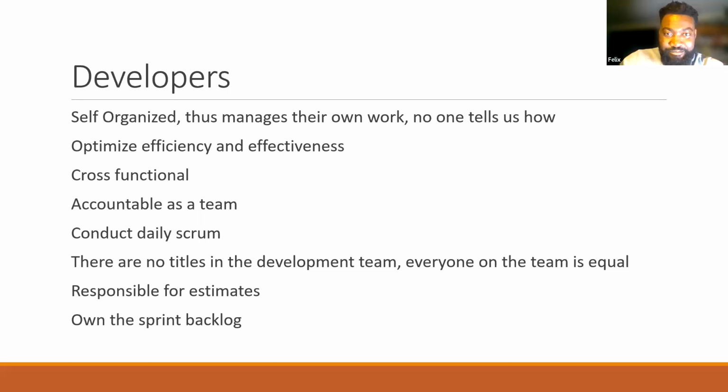Go ahead, Lady Anne. What I get from here is a kind of micromanaging. It's like your manager or whoever is trying to use velocity as a measure of productivity, which is totally an anti-pattern. Velocity cannot be used to measure the productivity of your team based on the number of stories they're doing or the quality of what they're doing. If you use that route, you're going to mislead your team. The velocity is just a guide to how much they can commit to every sprint.